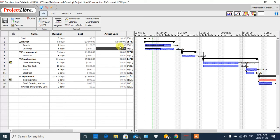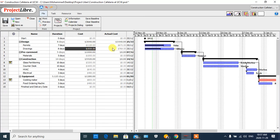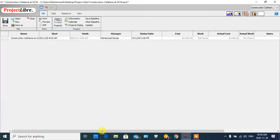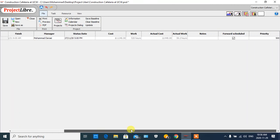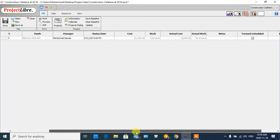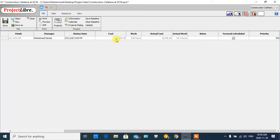Here in the 'Actual Cost' column we can see it has changed. It means that, for example, 80% of the overall cost is calculated by ProjectLibre as actual cost, and 40% of the other task cost is calculated as what the project has paid so far. If I click on 'File' and then 'Project,' you can see a summary of our cost, the project name — for example, 'Construction at University' — and the start and finish date.